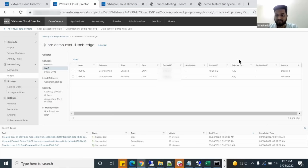Just 2-3 days before, we prepare this backend infra ready. And after that, we will do the migration, once we know that, yes, the customer has given the migration go-ahead window for this day. So 2 days before, we will start the replication using vCloud Availability. So these all are day one and day two tasks before the downtime window. Yeah, that's quite nice. So you can get it all prepared, all ready to rock and roll, and literally you're just doing the final replication and some checking.